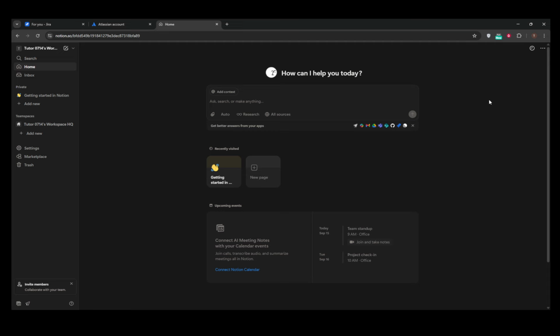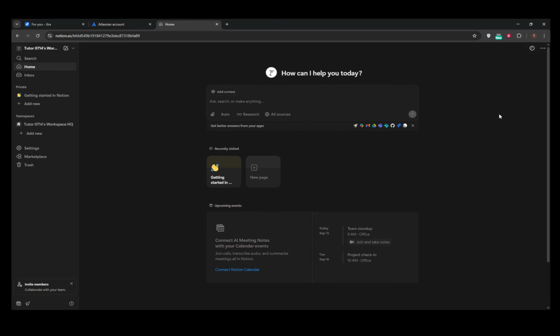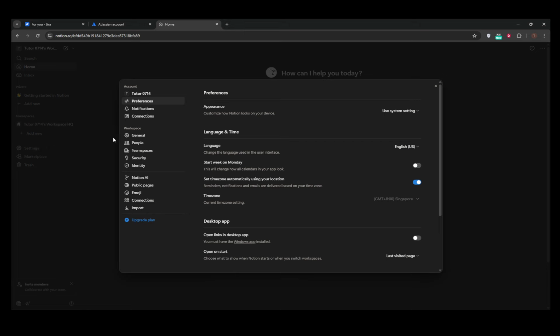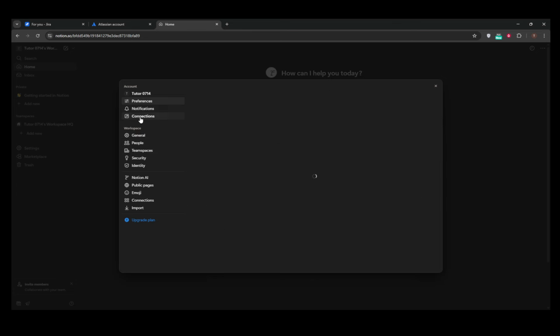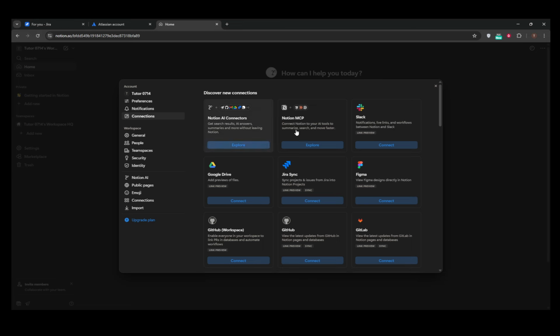Now, let's navigate to Notion's settings. Go ahead and open Notion, then head over to the settings. Here, you'll either go to Connections if you're setting up a legacy Jira connection, or directly to Import and select Jira Sync if you're using the newer synchronization tool. This distinction is essential because the path you choose will determine the range of integration features you'll have at your disposal. The next step is to authenticate with Jira.